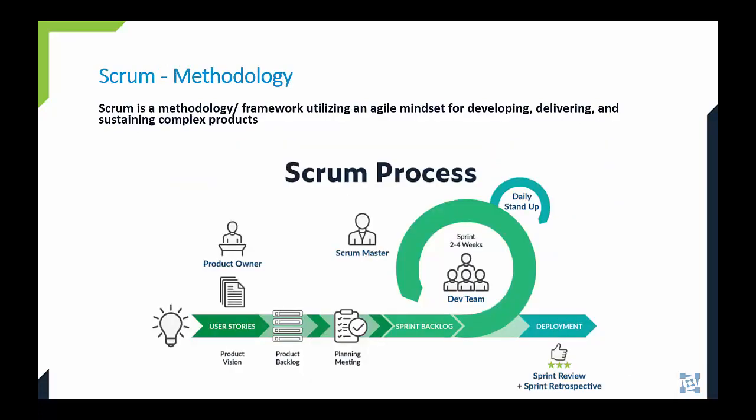If not all of you, most of you are familiar with the Scrum project management methodology, so I'm not going to spend a whole lot of time here. But we use it here at Parasoft for our software development, and it brings cross-functional teams together to work towards a common product vision and goals in delivering our software solutions with openness, transparency, and respect. We have sprint meetings to synchronize. In these meetings, we determine what is being delivered, what didn't get done or completed, and needs to go to the backlog. We also check if any requirements change and how to manage that change.